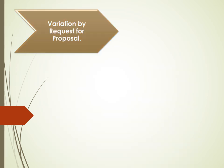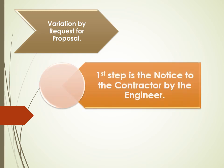Variation by Request for Proposal. The first step is the Notice to the Contractor by the Engineer. Before instructing a Variation, the Engineer is to give the Notice to the Contractor that defines and describes the proposed changes.